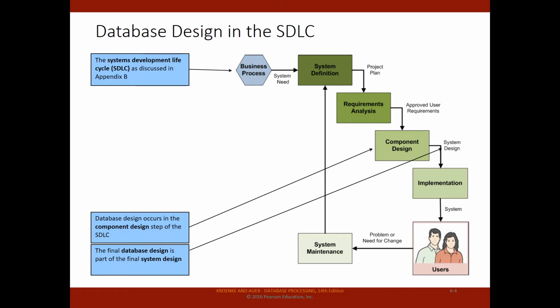You came up with the Gantt chart, which actually created for us a really nice critical path. And that critical path, basically the red line, tells us that whatever task is within this red line, we will not be able to delay anymore. But if there is anything in the blue line or any other line, then it is flexible. We can delay it. So the output of the first step was the project plan, which was in the form of a charter that you submitted and a Gantt chart.